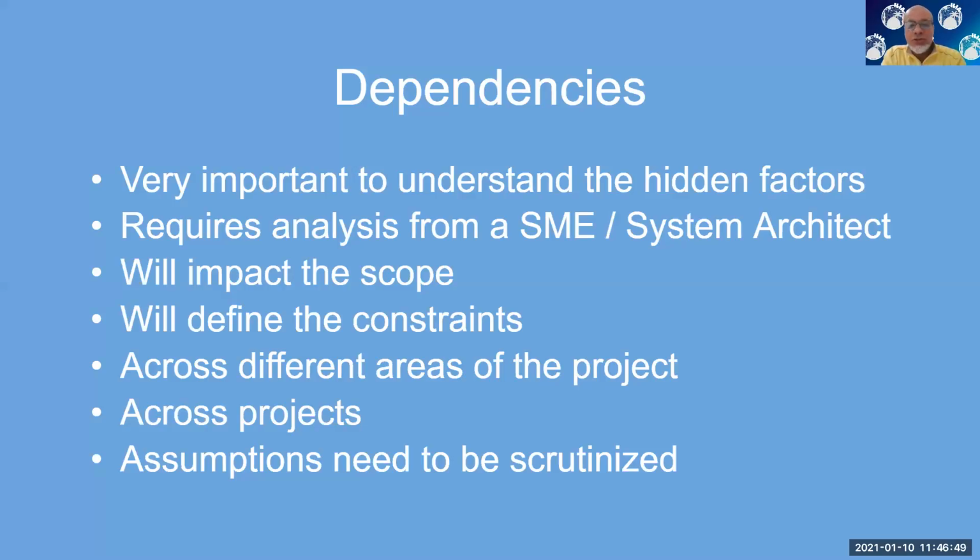Dependencies are usually cross-functional. They usually cross different domains within the project. For example, with the youth crisis line again, you can have a dependency on what type of telecommunication service to bring into your call center based on the expertise level of your counselors. If they are tech savvy, you might be able to bring a more advanced technology solution.